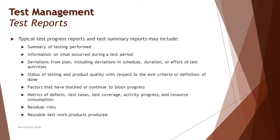During the entire software testing life cycle, right from test planning till test closure, the Test Progress Report will be created multiple times at multiple milestones — for example when test execution kicks off, when different levels are completed, or if you're following agile, each sprint completion could be a milestone. You can populate a Test Progress Report sharing information like a summary of testing performed in that sprint, what occurred during the test period — for example you executed 20 test cases, 15 passed, 5 failed, or 30 test cases where 2 got blocked due to environment issues or test data.